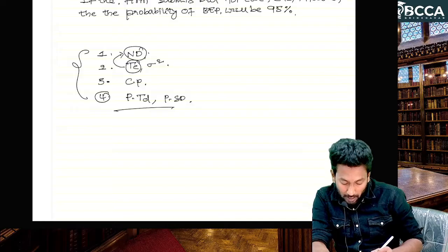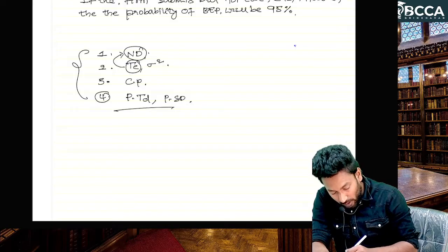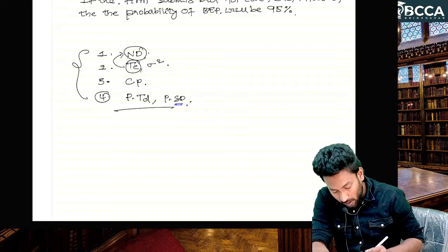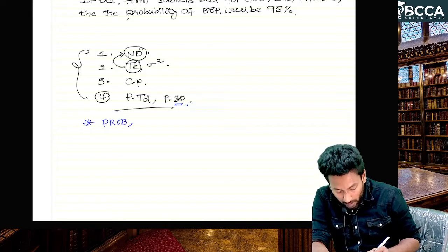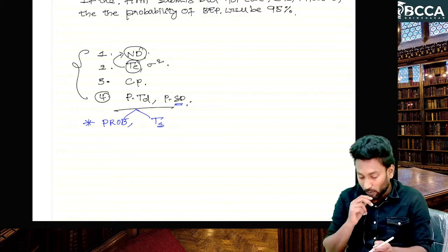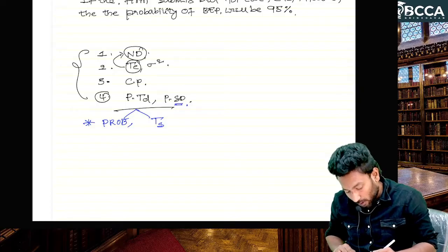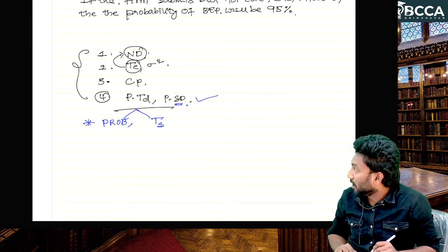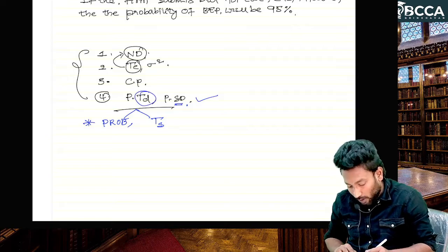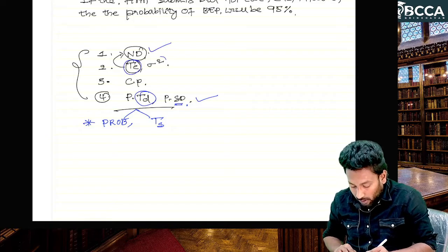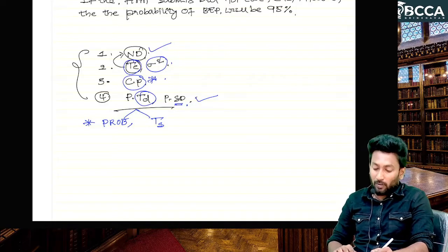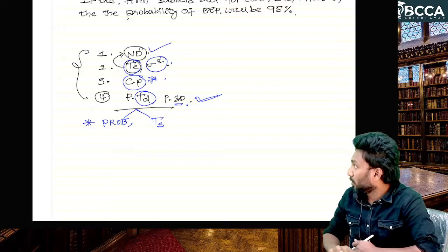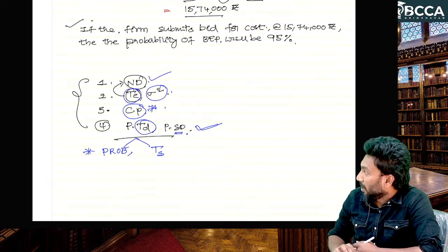After calculating the project duration and project standard deviation, we can do the estimation and probability calculations, and the stipulated time calculations. All those calculations we can do based on these values only. So we need the project standard deviation and the project time duration. For that we have to draw the network diagram, TE values, variance values, and identify the critical path. Then only you will get these values. This is the procedure of program evaluation review technique.